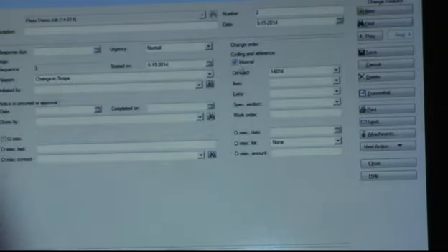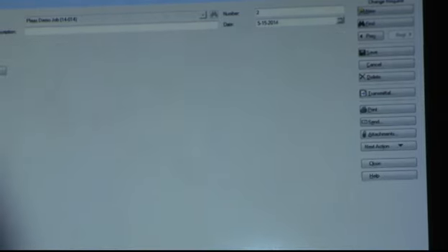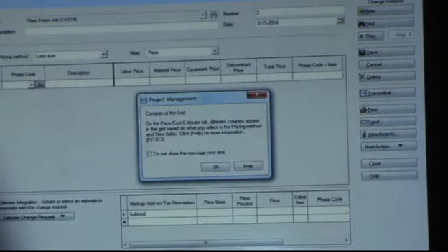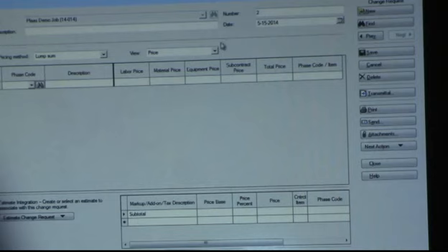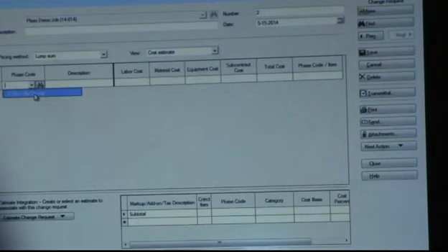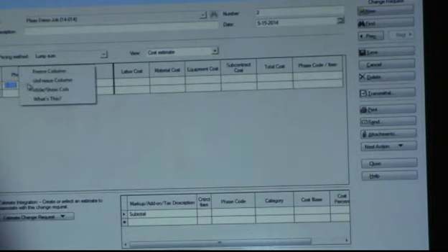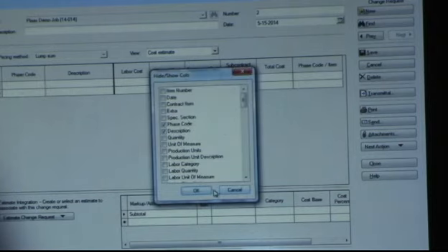But basically, there's a checkbox here to say internal. For a lot of the reports, when you print the log, you have the choice to print everything or just the not internal. So if you want to print a list of changes to give to your customer, you would print the one that doesn't show all the internal stuff. That checkbox controls that. And then on this grid, we only have one code. I don't remember where I put the dollars.